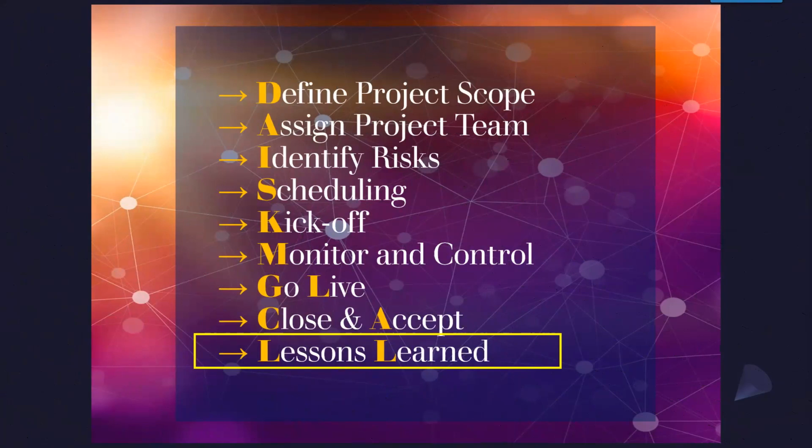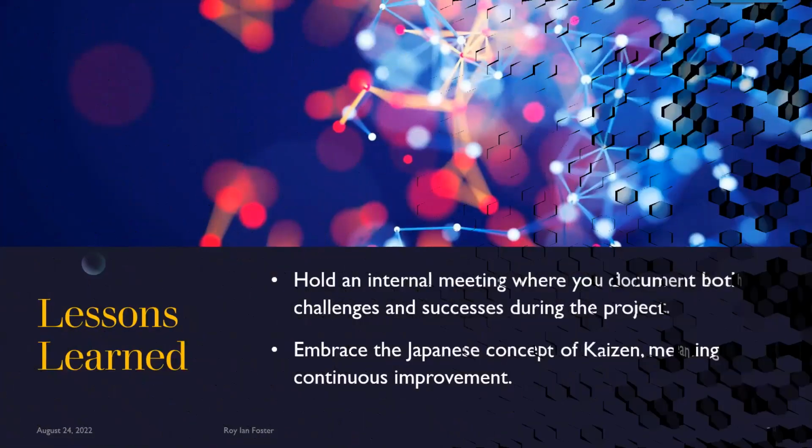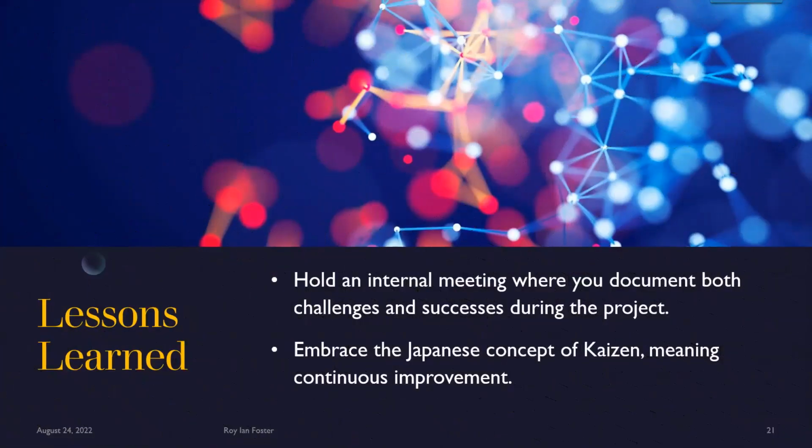And then the thing that may be overlooked the most is lessons learned. It's a really important opportunity to take the things that not only didn't go well, but also things that maybe did go well. And it's important that an organization understand if it's doing something that has value, to keep doing it. So it may be that there are things being done in your projects, and no one ever gives feedback on it. And at some point, when the process is being refined and updated, those things may get stripped out if there's no feedback to the organization doing the changes that, in fact, those things add value. So yeah, it's important to capture successes as well as things that were issues or did not go well.